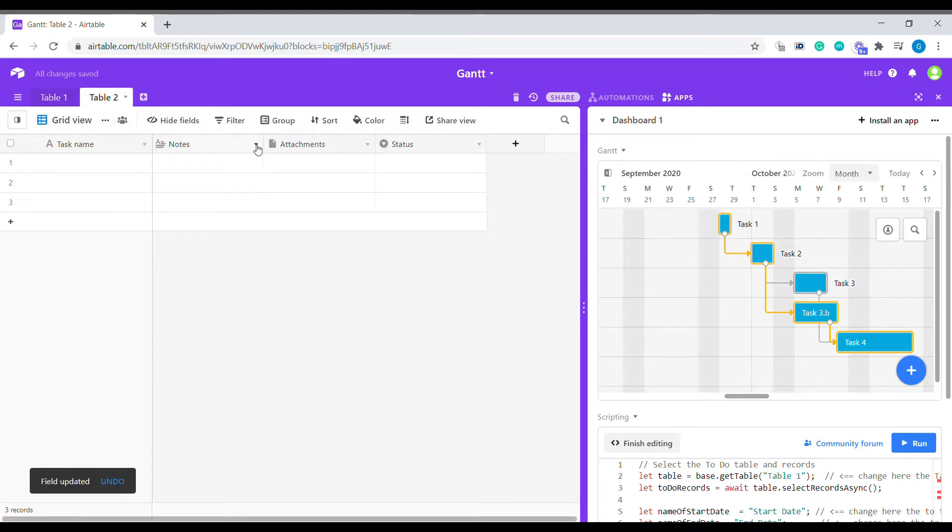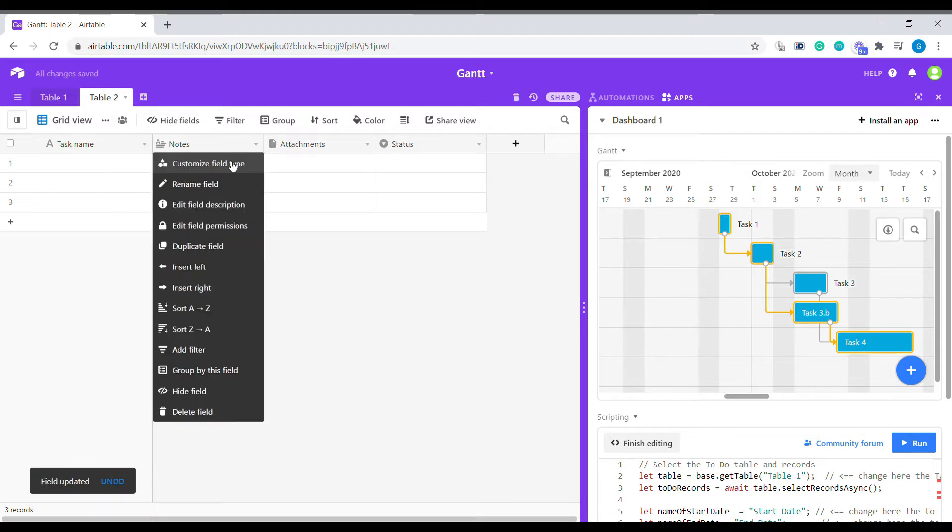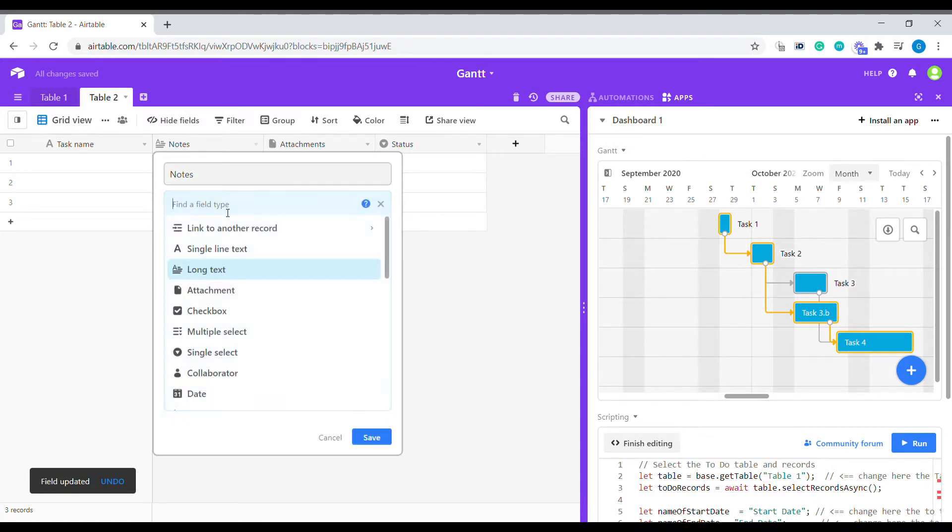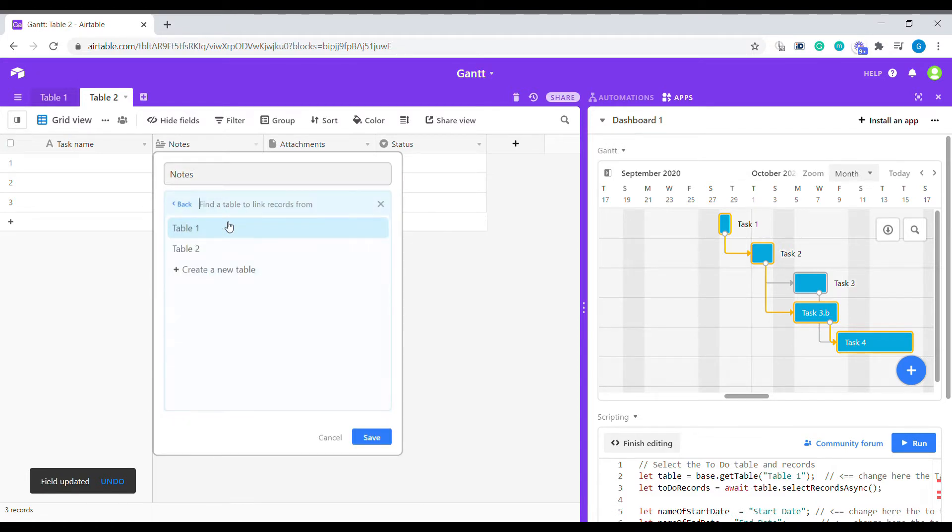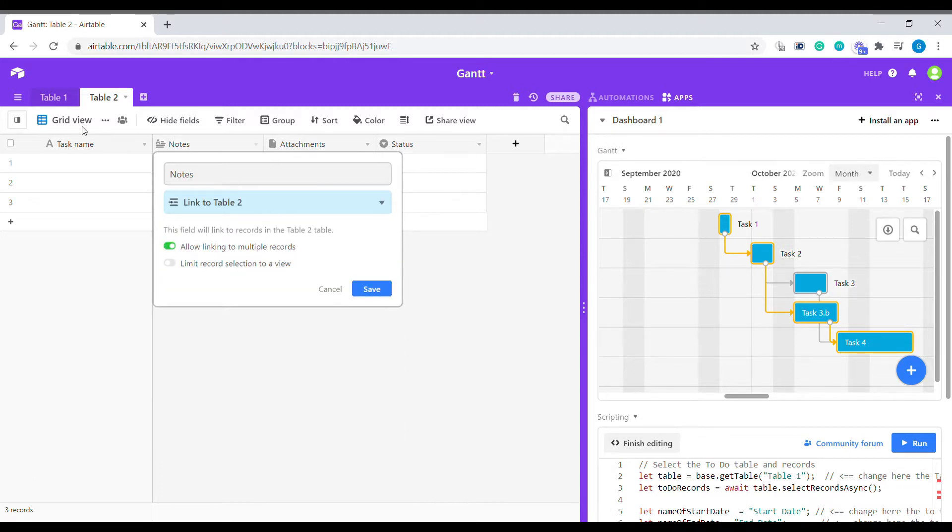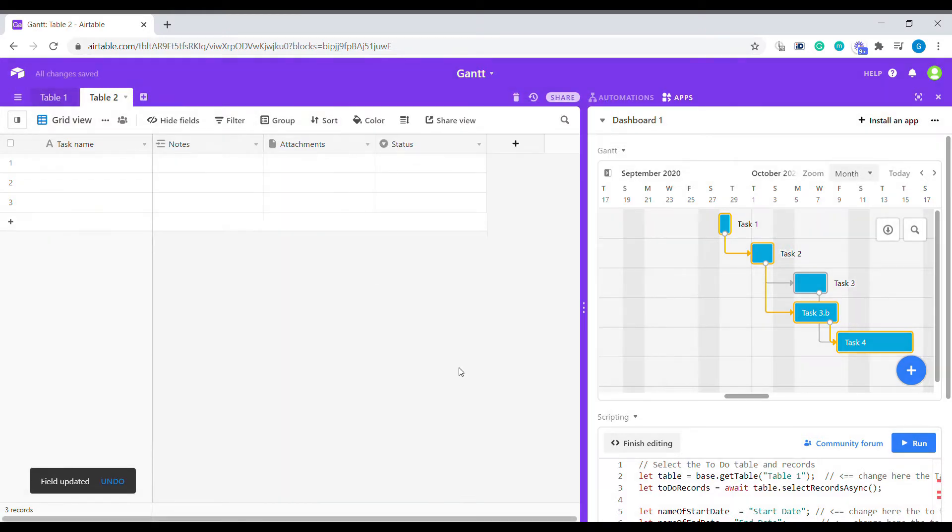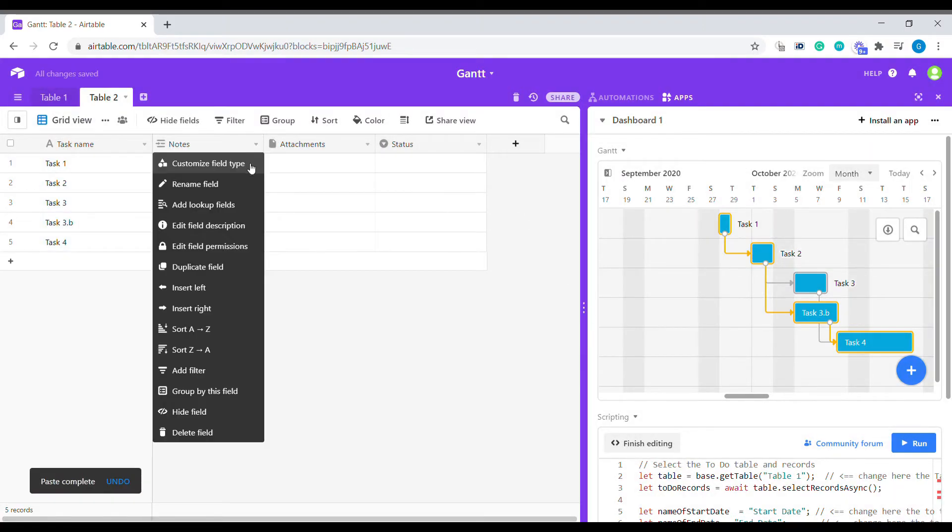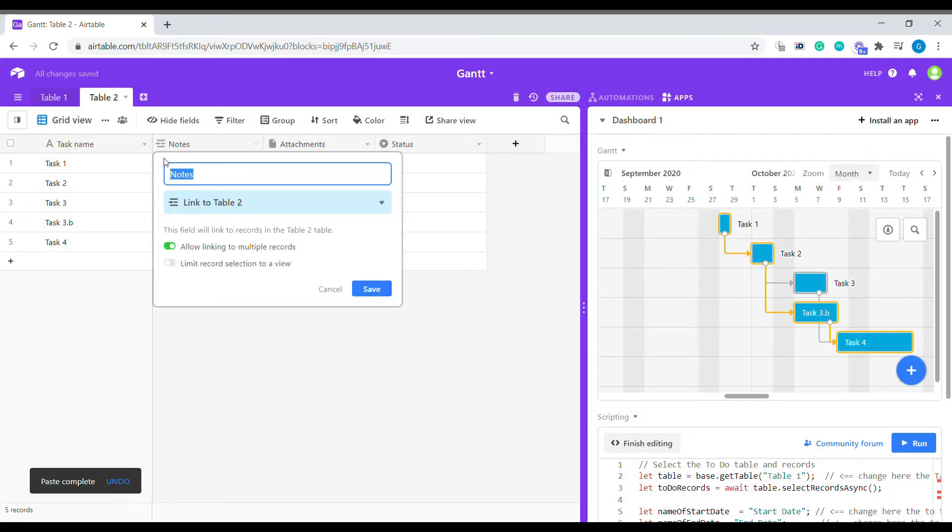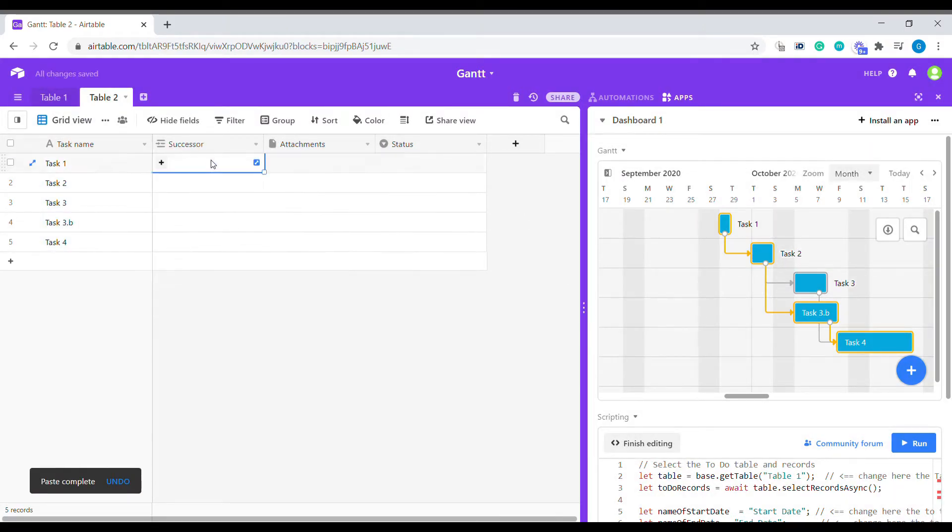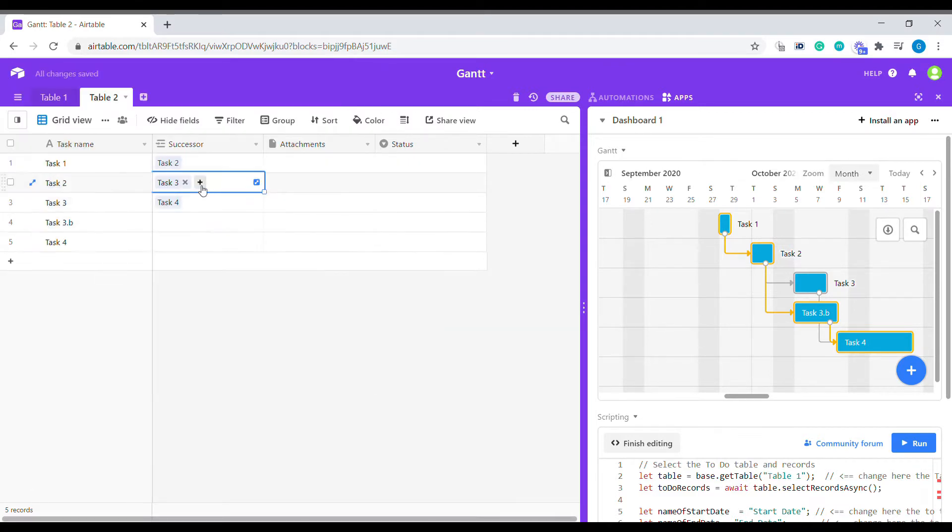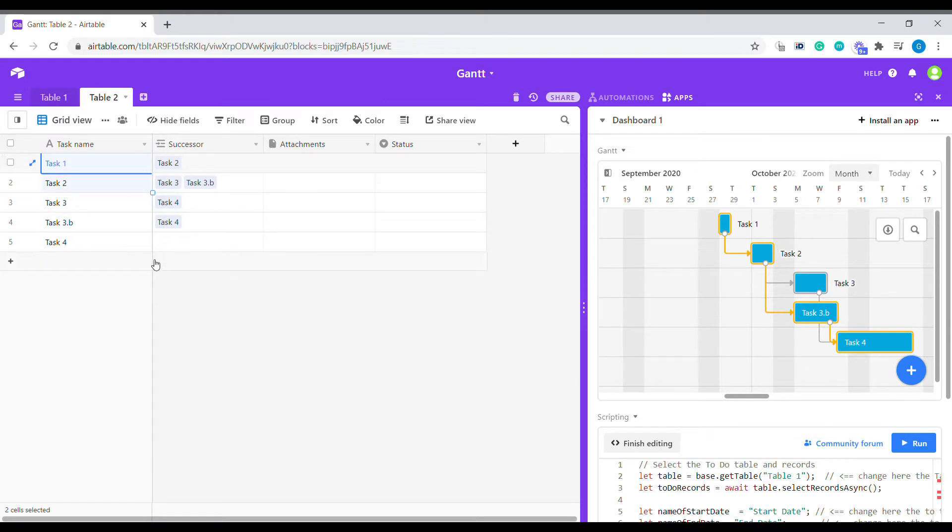What is essential in a Gantt chart is that we also need to have a link to the successor tasks in our table. So we're going to link to the same table and we're going to be linking to other tasks here. Let's copy the sample names of those tasks. We're going to call it successor. Now each task has a successor which needs to be executed after the first task is completed.